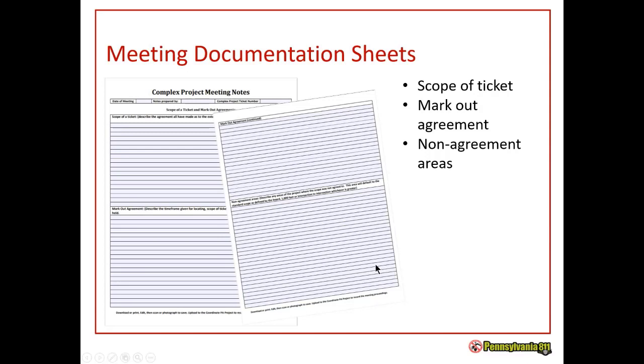And of importance, if there's something that's not agreed to on that locate schedule, make sure that gets put in the notes as well. Anything that's not agreed to for the locate schedule will need to be put in as routine excavation notices through the Coordinate PA system.